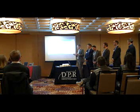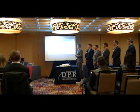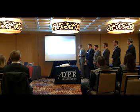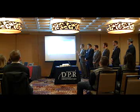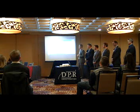And it is absolutely vital that we stay on our critical path because we don't want to take on any liquidated damages. According to contract A, 1 day of liquidated damages is going to cost us $7,000. So in order to avoid that, we're going to utilize pull planning and milestones in the schedule. The entirety of the project will be 448 working days, which is about 630 calendar days.